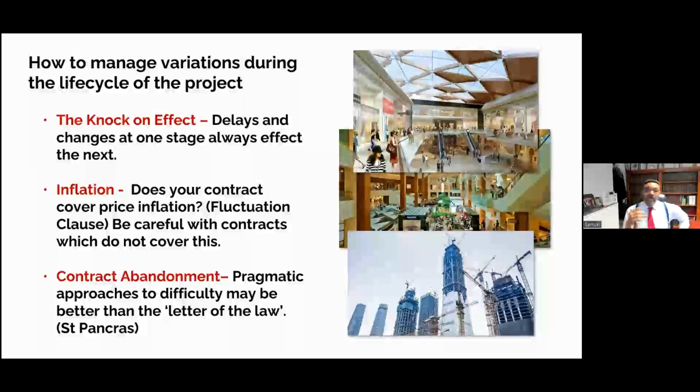That effect on the next stage does not always mean an extension, because you can, of course, if you just take two quick steps backwards into your programming, every construction activity has a start, the earliest start date and the latest start date and the duration. And therefore, you can calculate what float, if any, the spare time that exists within the delivery of that work element, of that activity.